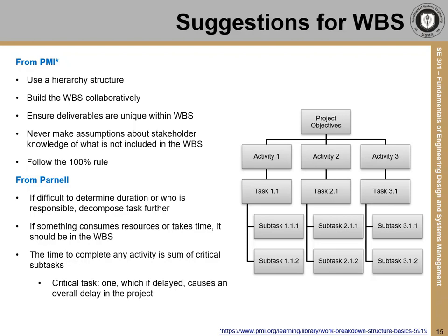Never make assumptions that stakeholders will naturally know that a deliverable element or task is part of the project if it isn't included in the WBS. If in doubt, include it. As you decompose, you should follow the 100% rule. The 100% rule says that when you decompose a deliverable or task in the WBS, that next level needs to contain all of the elements needed to make up 100% of the parent element.